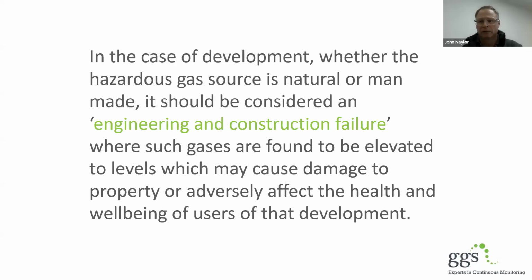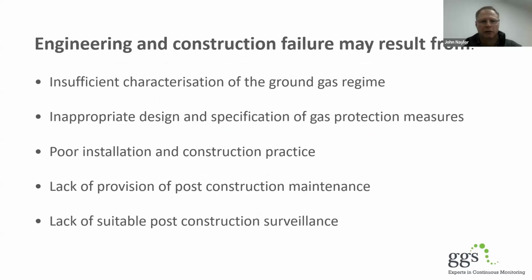If we didn't know it was there, then why not? Did we fail in our site investigation and risk assessment element? And here are the sort of main reasons. We didn't do enough in the beginning to identify the problem, if there was one. Once we did, we then didn't do enough to design and specify the gas protection system, or we didn't really recognize what was going on properly. We then didn't install it properly, a poor construction practice, or we didn't maintain it and we didn't actually check it. So as you can see, they're all kind of built into one where ultimately you end up with sometimes, hopefully not very many, not in a good position.